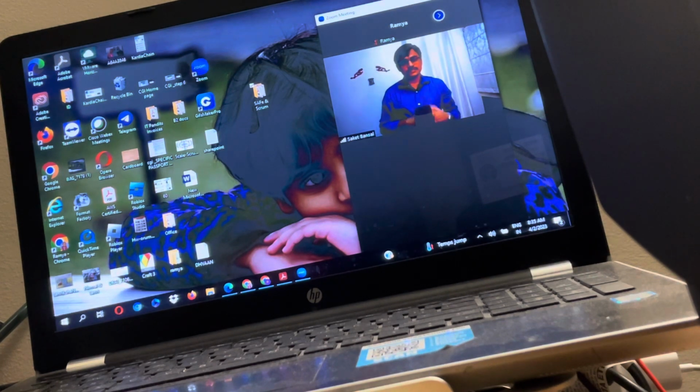But if the conflicts are related to technical challenges, they are better handled by the system architect. If no one can understand what type of conflict it is, by default it goes to the release train engineer, because any conflict or problem is an impediment which is slowing you down. If nobody understands it, the release train engineer should find out who should resolve it.